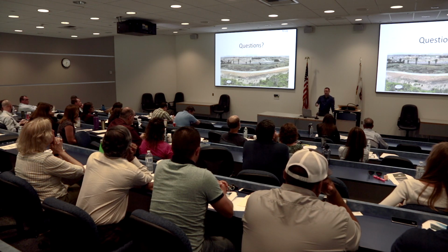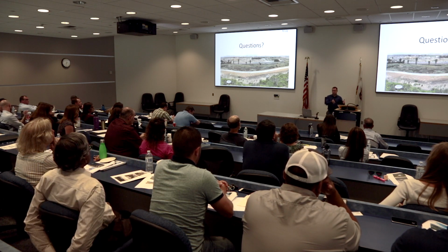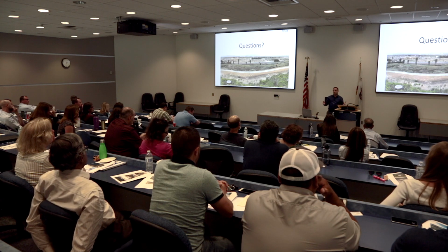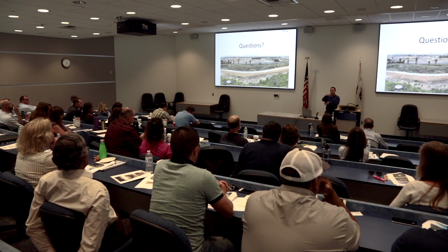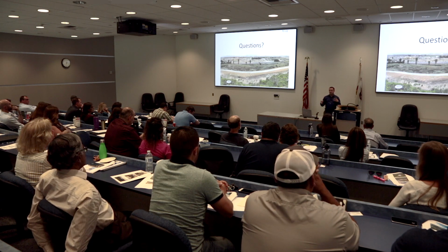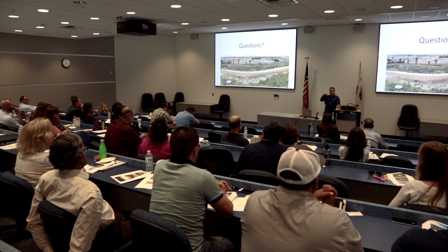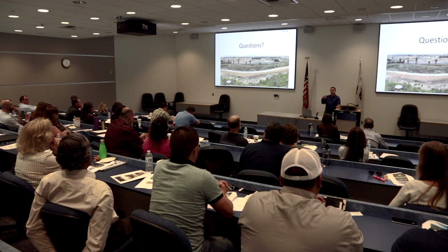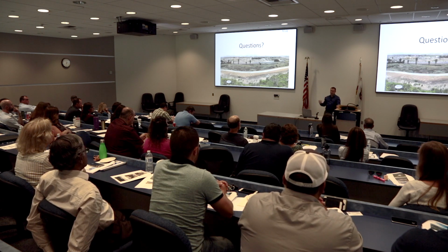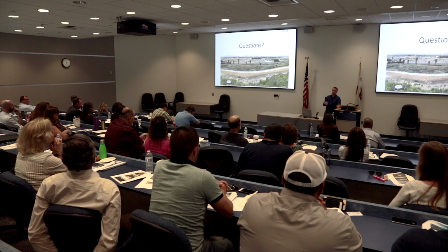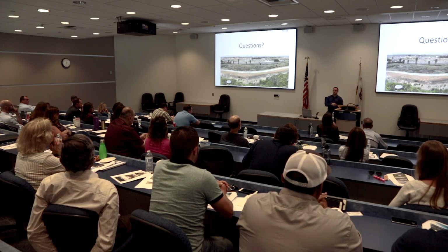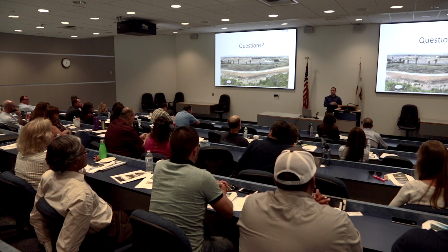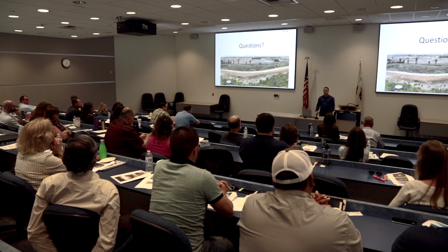When an engineer is designing a site, especially one that large, there are 224 homes in that site, multiple streets, multiple phases. There are 3 phases of the whole overall tract, but within each phase there are at least 8 phases of construction, so you're talking about at least 24 phases of construction. I think one of the phases has 11 or 12 phases. So that's a lot of phases, right?